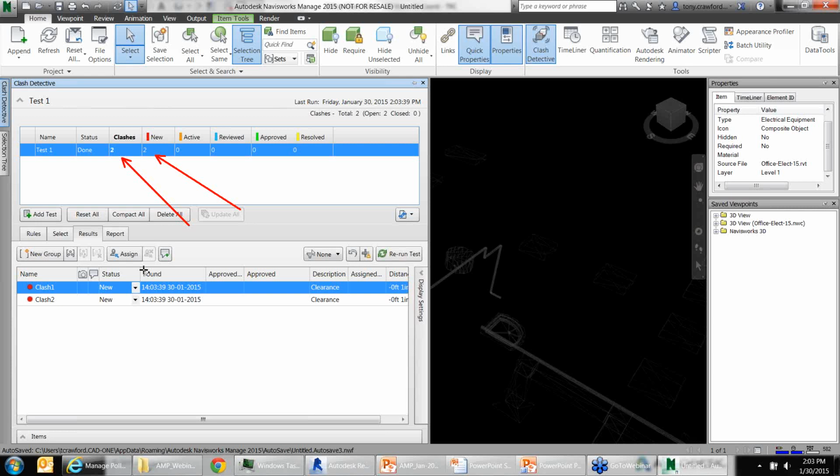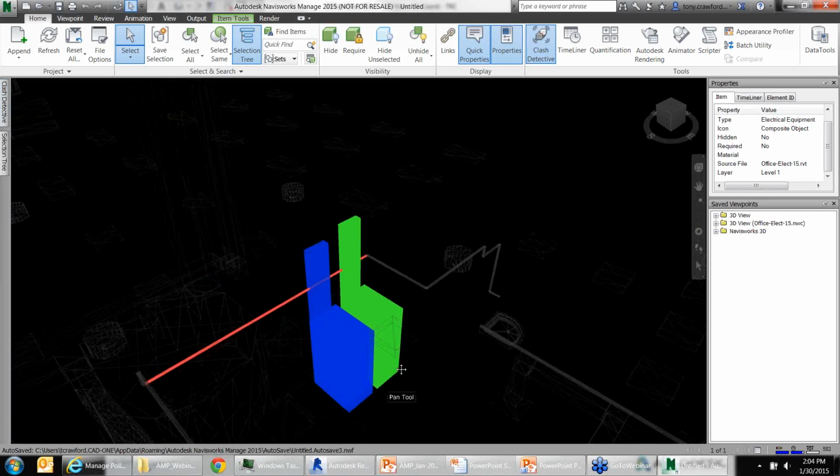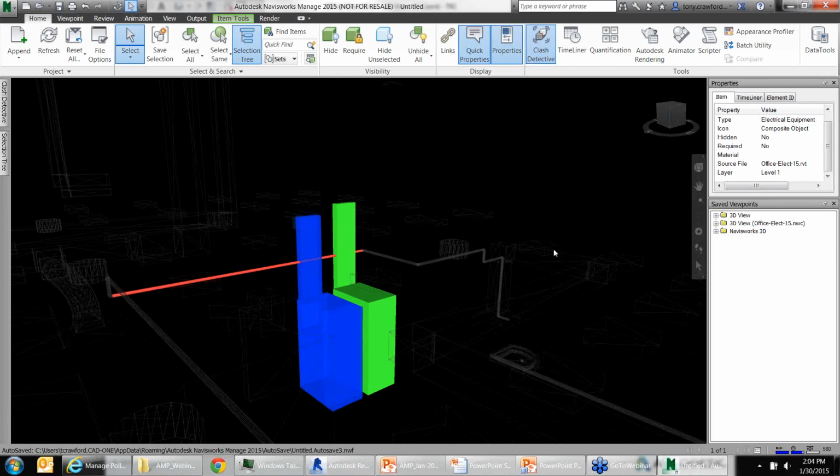And a lot of times with a clash detection tool, the number's not inflated, but what you might call one clash, Navisworks might call 12 clashes. If the same pipe runs through 6 beams and 6 cable trays or whatever it is, that's one pipe. You can move that one pipe down, move that one pipe over, and you've just cleared 6 clashes. So that's basically the meat of it, the clash detection tool, the switchback tool.